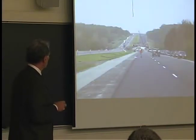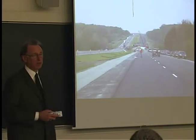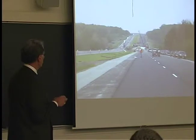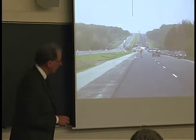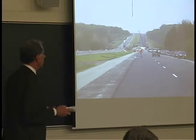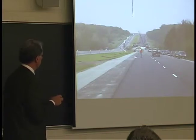These were the bridges that we had down here that we had to raise because of adding 17 or 17 and a half inches. So we took the bridge decks off of that, and we reused the steel, but we took all the concrete off. We cleaned up the steel. We put new studs back on the steel, raised the abutments in the piers, or we tore out the piers, used the abutments, and raised the bridge by 17 inches, and then we poured a new bridge deck.